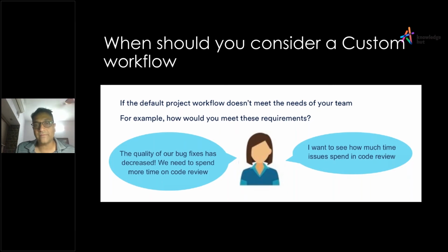For instance, if you say we are seeing a lot of bugs today and we would like to do some bug fixes, but the quality of our bug fixes isn't so good, you want to add a review step, so it has to go through reviews, and we would also like to ensure we see how much time people are spending in the reviews. Now this is one additional step that you want to introduce, especially for bugs.